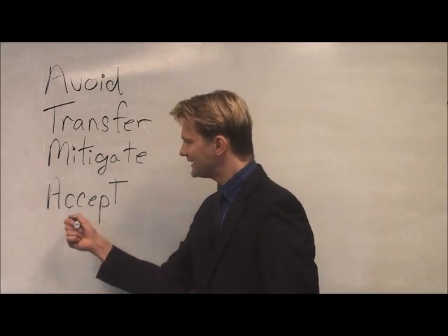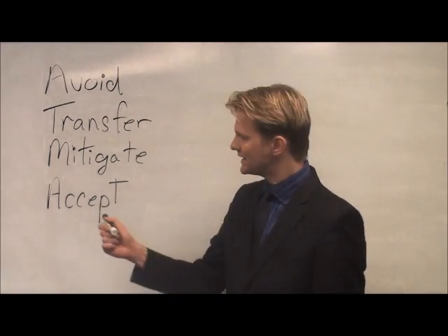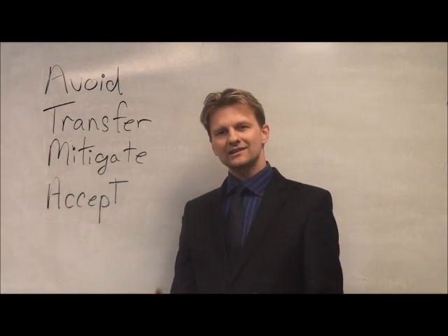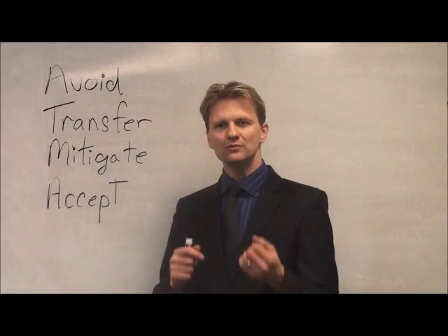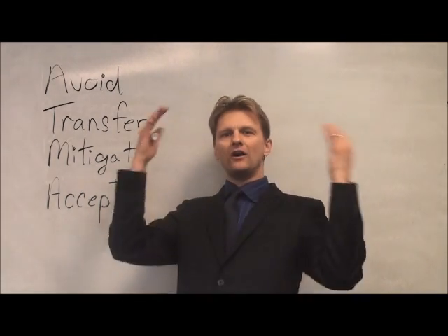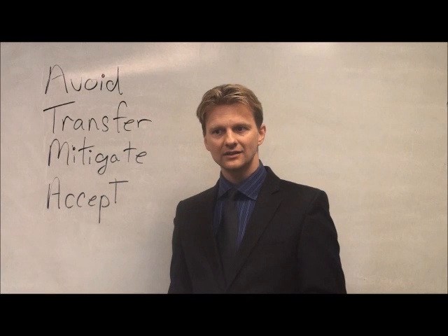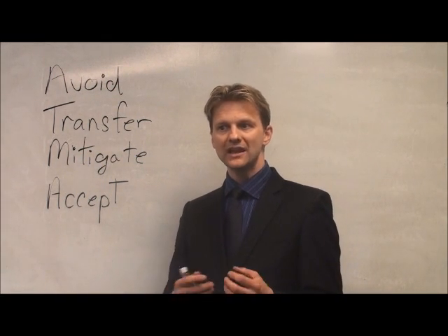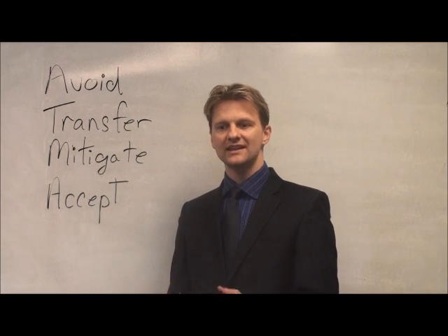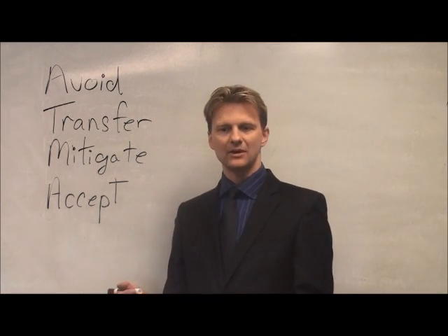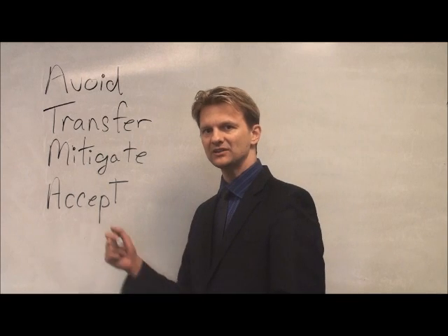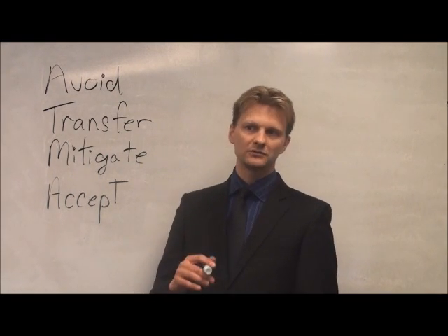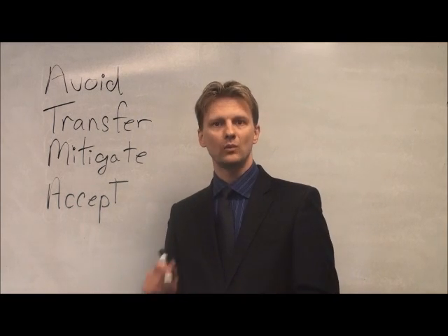So you're not getting rid of it, but you're trying to lessen those parameters. That's mitigation. Here is the baby that I like talking about and nobody does. It's acceptance. Acceptance is the most common risk response that we all follow in a project. But it's the least talked about because people don't like to mention that these risks exist and we're not doing anything about it. Because that's what acceptance is. Acceptance is defined as you do nothing. It's going to happen or it won't. And if it happens, we'll deal with it when it comes.